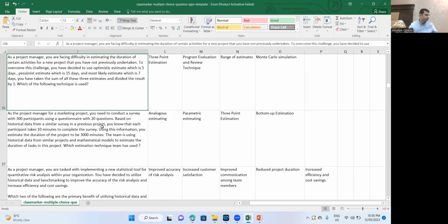Okay. As a project manager, you are facing difficulty in estimating the duration of certain activities for a new project that you have not previously undertaken. To overcome this challenge, you have decided to use an optimistic estimate, which is 5 days, a pessimistic estimate, which is 15 days, and a most likely estimate, which is 7 days. You have taken the sum of all these three estimates and divided the result by 3. Which of the following techniques is used?